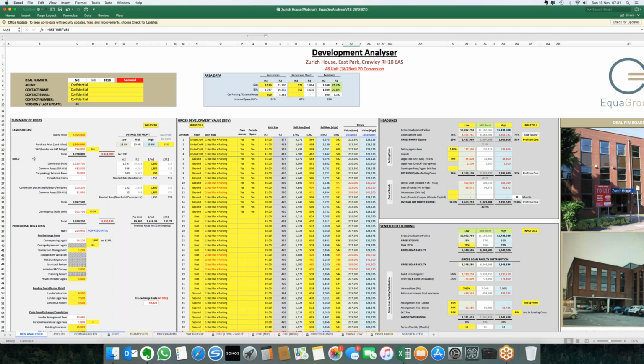So this is the budget in this illustration that covers off the main contract. So it'll be one, probably a JCT form contract that will be issued to a major contractor to carry out the full refurbishment of this site. So under CDM, the term is principal contractor, so they will be employed on that basis. So we can see here that the principal numbers here are on a pound per square meter basis.